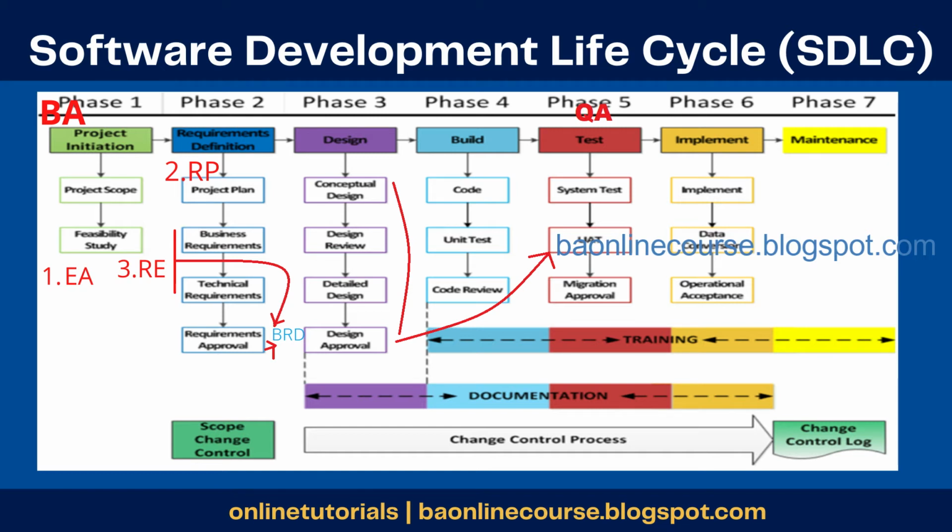So if I've prepared a mobile banking app, the QA team of the client organization would do the testing. If they find any defects, they will report it to the business analyst or to the QA lead. These guys in turn would analyze the defect. If they find there's a problem with the code, they will report it to the architect and then the development team. So these guys would fix it.